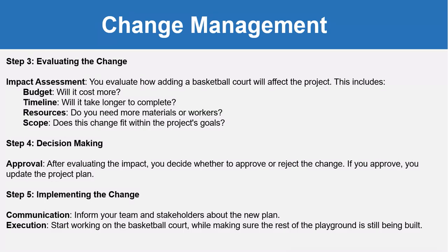Then we will evaluate the change. That means how much cost will be required, will it take longer to complete, and do we need any material or workers for that change, or does this change fit within the project goal or not. So based on that, once we have evaluated the impact, we will decide whether to approve or reject the change. If you approve, you update the project plan accordingly.